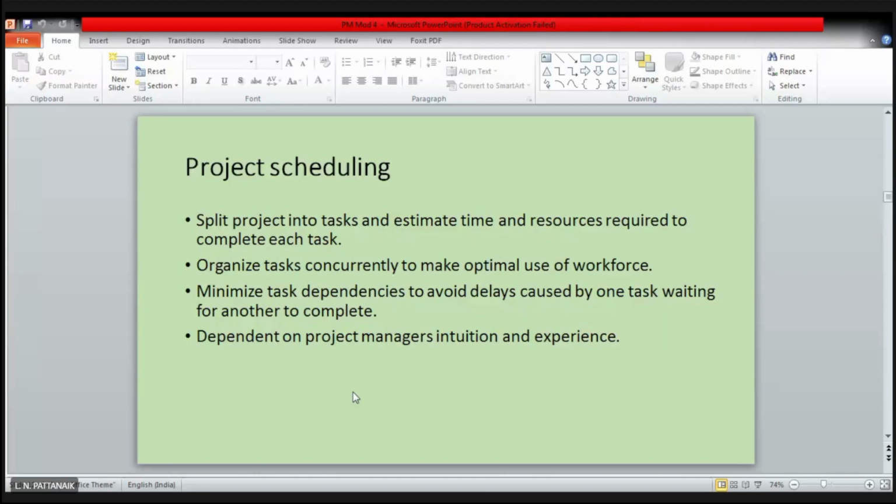you have to. For example, you cannot start the brick wall until and unless your piling and foundation work is over. That is a technical constraint, a technical binding that you have. Otherwise, maybe the doors and windows you can fabricate separately. It is not depending on any activities of your house building, right? Maybe some other activity we can do parallelly. So it's not necessary to make them depend on some activities. That is the point here.